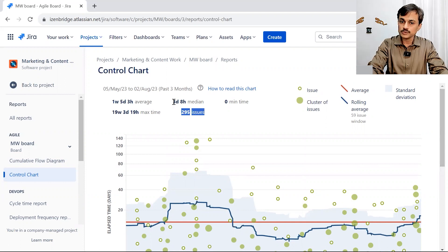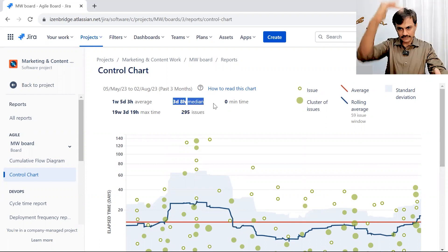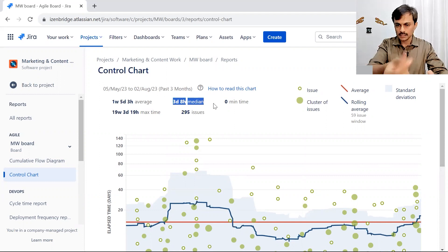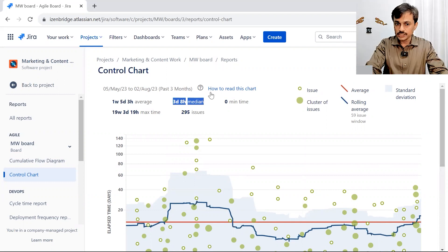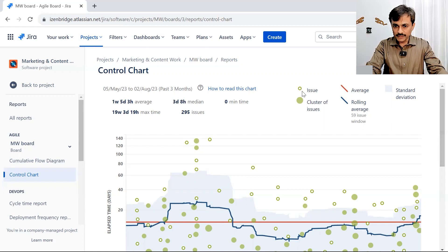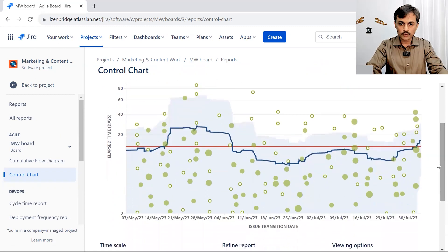You also see a median. The median is — if you put everything in order and pick the middle issue — you might find that issue has three days and eight hours of cycle time. So you have individual issue representation and cluster-of-issues representation.